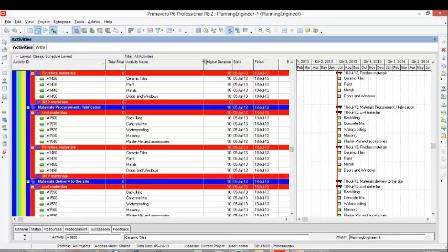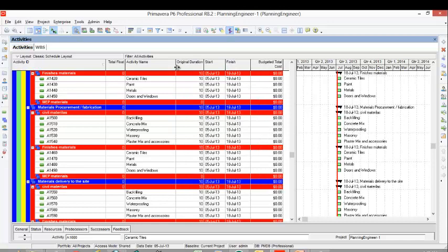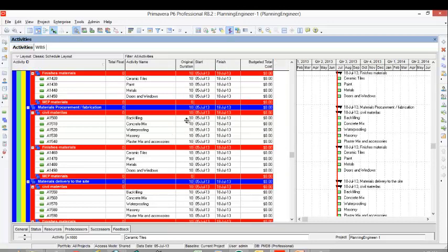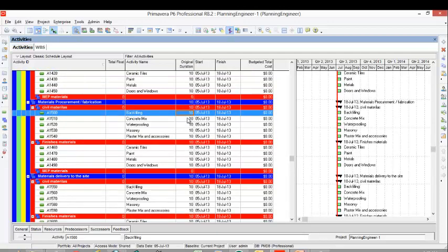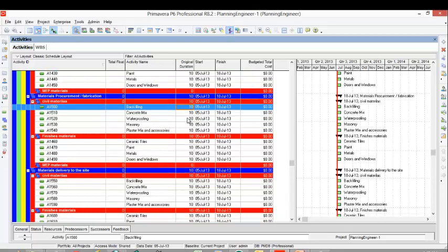This is very, very important and could impact your dates, because if you have any long lead materials. So for now, I will assume some dates, and in reality I'm assuming these dates as well. Then I'm giving them to the procurement department to confirm, or if I already have the information, I'm putting them directly here.